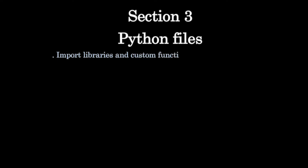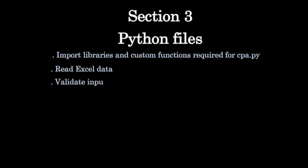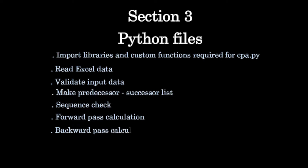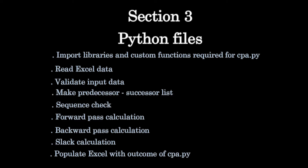Critical path analysis follows nine steps: import libraries and custom functions, read Excel data, validate input data, create predecessor-successor list, sequence check of activities, forward pass, backward pass, float calculation, and populate the worksheet with program results.